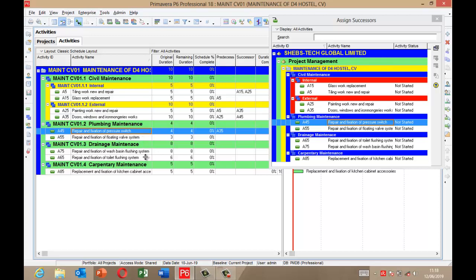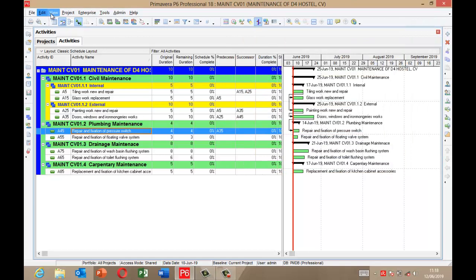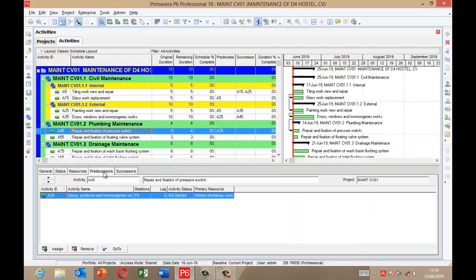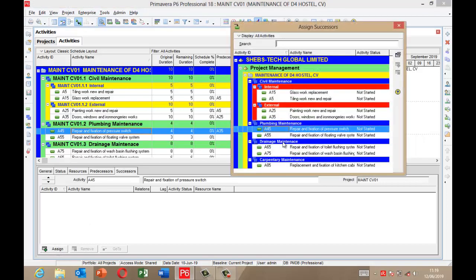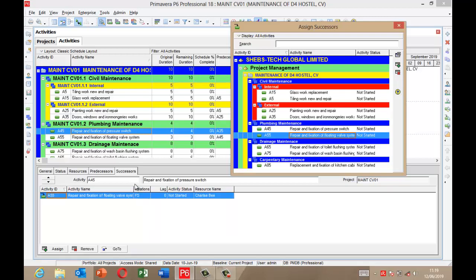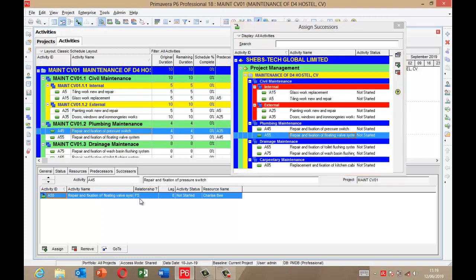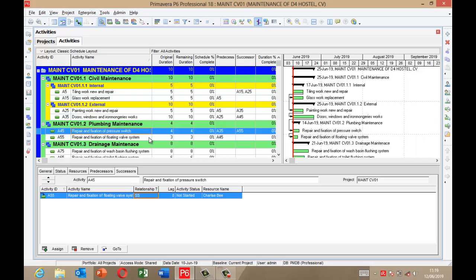These two activities — Repair and Fixing of Floating Valve System — will start together, so I'll show you how to do that using a different method. I click View, Show on Bottom, display the details. Go to the successor tab, click Assign, then select A55 which is Repair and Fixing of Floating Valve System, and double-click it. Now I want these two to start together, so instead of FS (Finish to Start), I double-click it and change it to SS, which means they will start at the same date. Closing shows that these two will start at the same date.